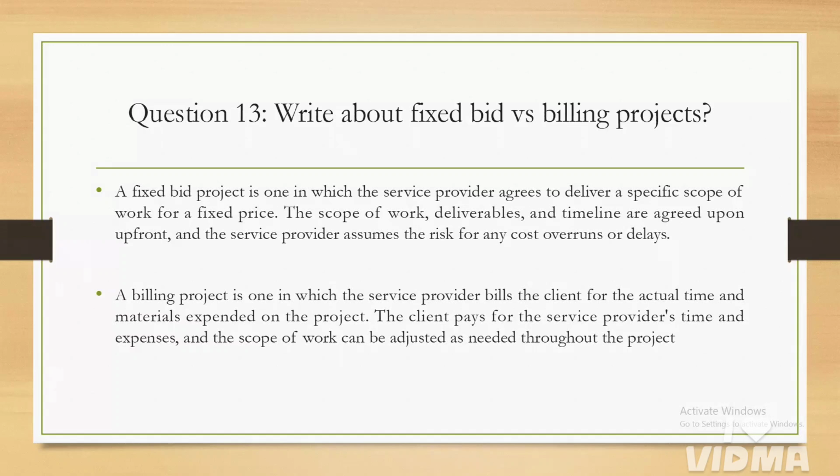For example, the client wants to develop a web application. He does not approach any software company, he just hires a few people, developers, who work for only 4 to 5 hours. He pays according to the hours worked. For example, for 1 hour he pays 500, so for 5 hours the developer gets 2500, right? He will be paying on a daily basis.